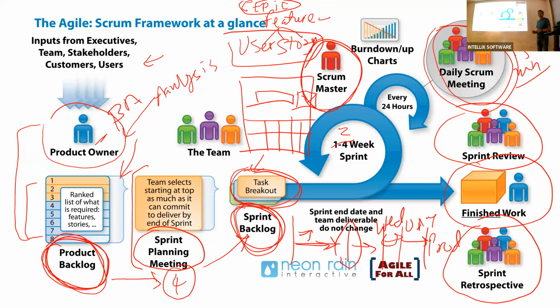Yeah, and I think as a result of the kind of testing process it goes through, by the time it gets to the sprint review, 9 out of 10 times it probably wouldn't be something significant to fix. No, sprint review is not about fixing it, right? It's about demoing the software to the business and getting their feedback. So feature-wise, everything has to be done before the sprint review. UAT has to be complete before the sprint review.